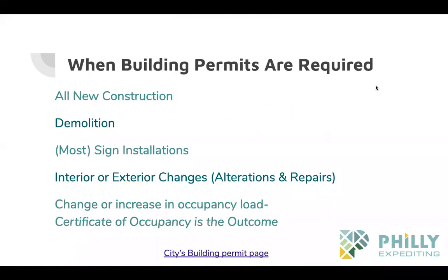So all new construction, of course, any demolition, most sign installations. If it's a sign that's like a sticker, you don't need a building permit, but if it's being fastened with something, then you need a building permit. Interior, exterior changes, which is what you were talking about with the tenant fit out, so alterations, repairs internally. And then also exterior changes to facades and signs. And then the elusive one, the change or increase in occupancy load. So going back to AJ, there was a change in the occupancy because the use was changing. So when use is changing, I think you can automatically assume the occupancy is changing too.